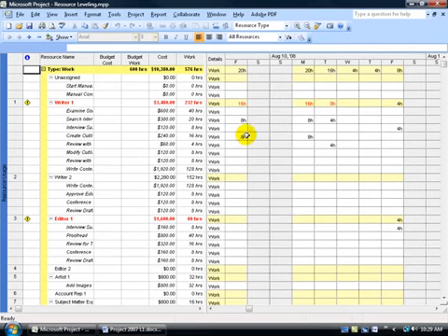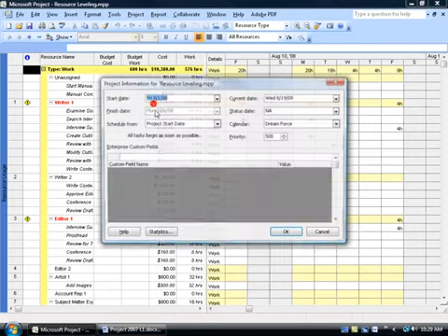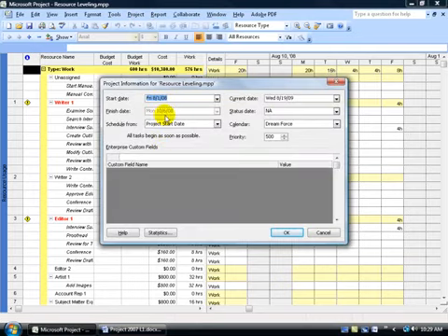So you're working on one task and you move along and you find that it conflicts with another. It may take that task, split it for 0 days that you're working on it, and then when the top task is finished or completed, it'll continue on with that second task. So either way it's going to be delayed, and it's going to delay out the project's end date, which, by the way, what's our project's end date? Come up here, click on the project menu, go down to project information, and right now the finish date is October 6. Okay, keep that in mind.